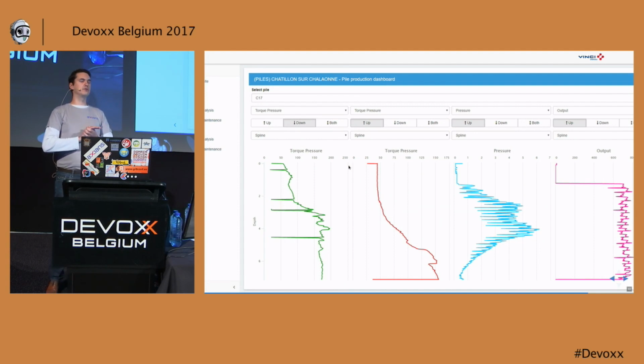Secondly, they really have to show or prove how the foundation was being done. And this is very specific to their business, of course, but for each pile they needed to supply some kind of certificate. In previous projects, they just used Excel and some kind of advanced Word with macros and stuff like that to say, this is the measurement, this is your quality report of the job being done. But for doing this for more than 63,000 piles, it's not very scalable. So we developed an application which can integrate with the machine itself, read out how the operation was done, and make a report from it.